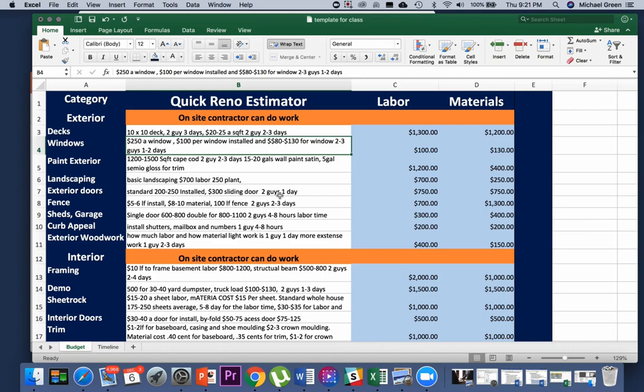It roughly would be $300 for each door, $600, and then $500 for the labor is $1,100. And then you need doorknobs for $100 each, about $1,300. Again, if you threw 1,000, you threw 1,500 in, you would be in the ballpark. You just need to get it close. I don't want you spending like 9 years on this, because you could make this take a really long time.